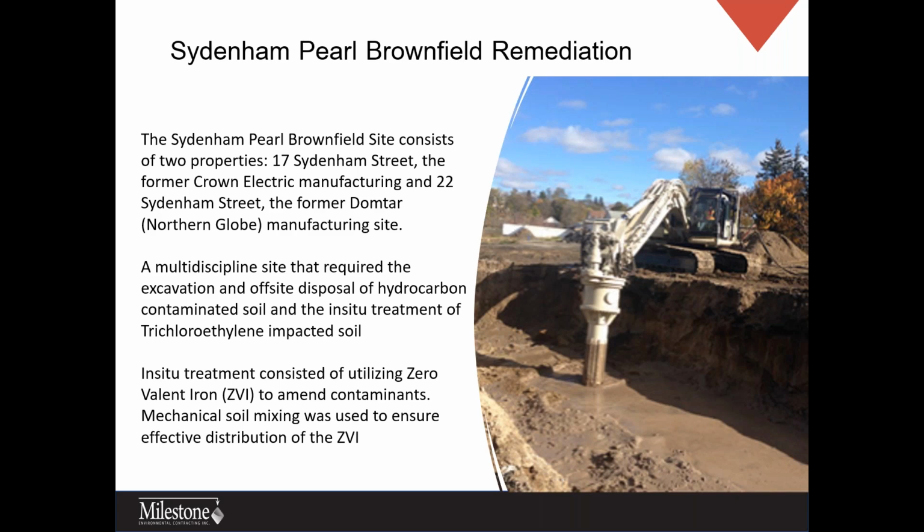Due to the close proximity of the residential properties and the project requirements to ensure there were no off-site adverse impacts, an air quality monitoring program was implemented consisting of VOC monitoring, particulate matter monitoring, noise monitoring, and a meteorological station. The VOC monitoring program focused on the period where the excavation and soil mixing would be occurring, where the VOC releases would be expected to occur.